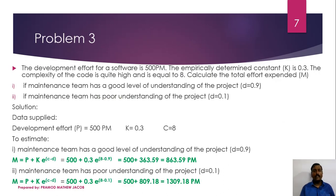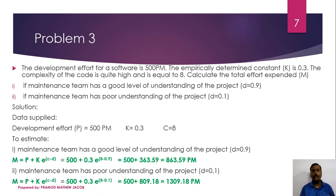Let's see a problem related to the Belady and Lehman model. The development effort for a software is 500 person months. The empirically determined constant K is 0.3. The complexity of the code is quite high and C is equal to 8. Calculate the total effort expended M if: first, the maintenance team has a good level of understanding, that is D equals 0.8, and second, if the maintenance team has poor understanding of the project, that is D equals 0.1.